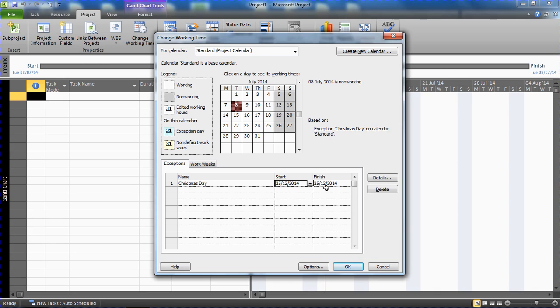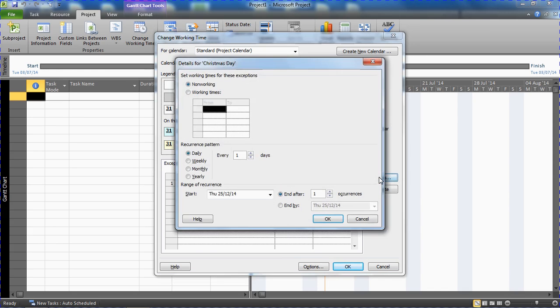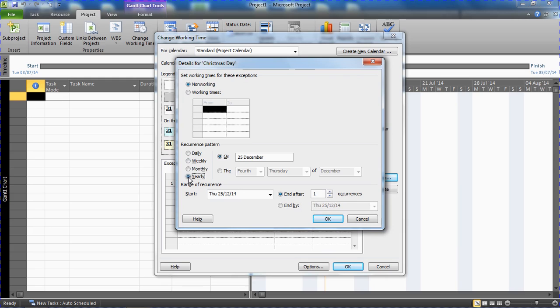So I'm going to go for this Details button on the right hand side where it has already been chosen as non-working time. But I'm going to select a recurrence pattern and choose Yearly, so you recognize that this happens on the same day every year.